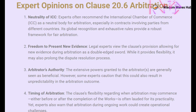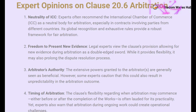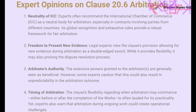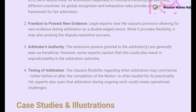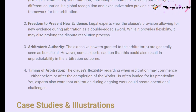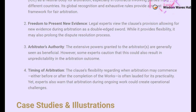The extensive powers granted to the arbitrators are generally seen as beneficial. However, experts caution that this could result in unpredictability in the arbitration outcome, so parties should be prepared for various possible scenarios. The flexibility regarding when arbitration may commence — either before or after the completion of the works — is often lauded for its practicality. However, experts also warn that arbitration during ongoing work could create operational challenges, affecting the project timeline and costs.